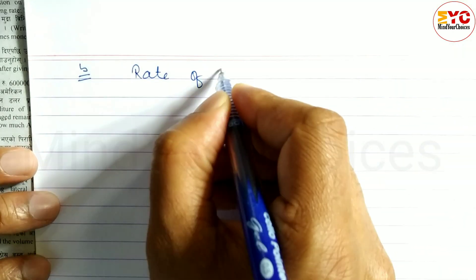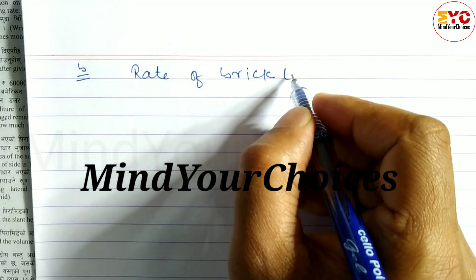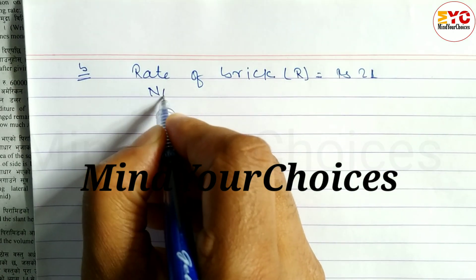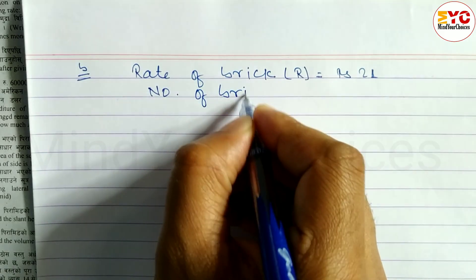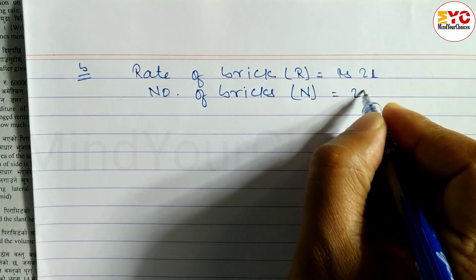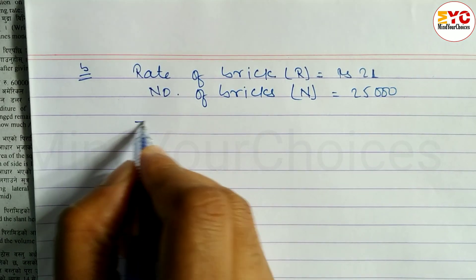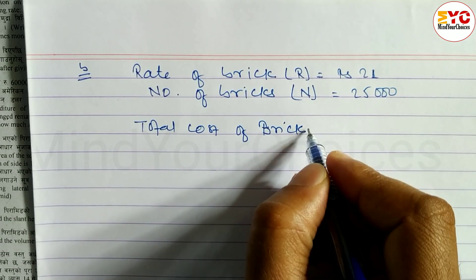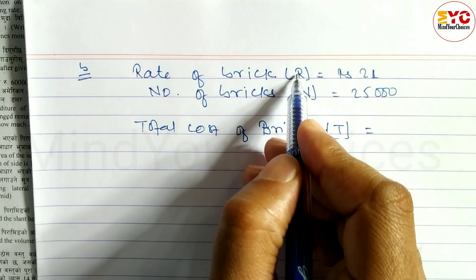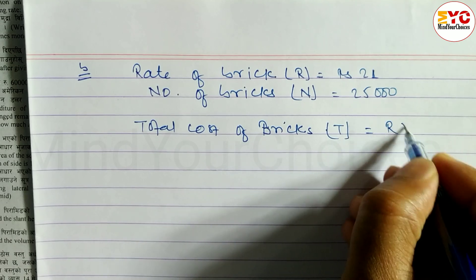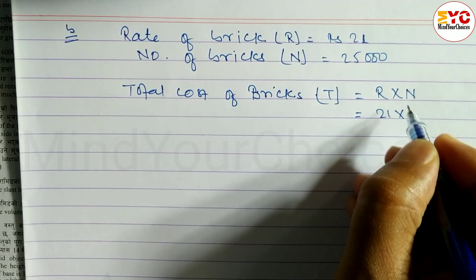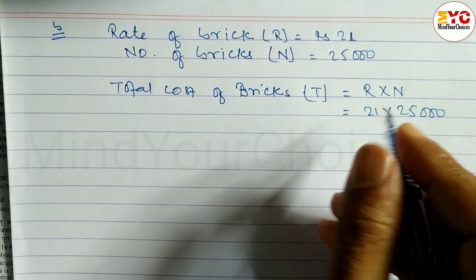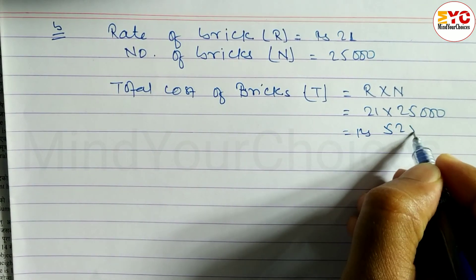Rate of brick C = Rs. 21. Total number of bricks N = 25,000. Total cost of bricks = C × N = 21 × 25,000, which equals Rs. 5,25,000.